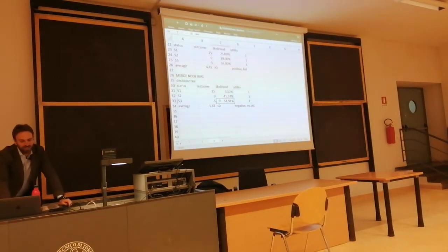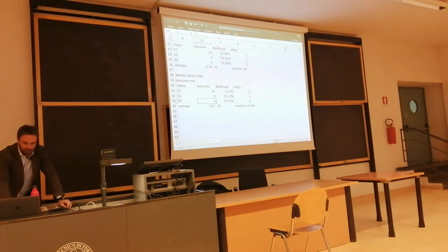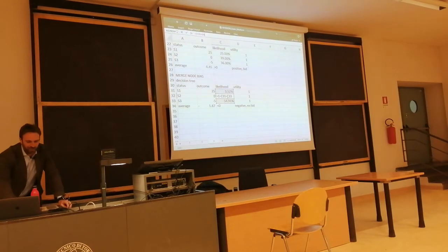There's 55% chances the project will finish after 23, and in that case we would incur a $5,000 penalty. But by difference, we still have 41% chances that the project finishes in between 20 and 23.